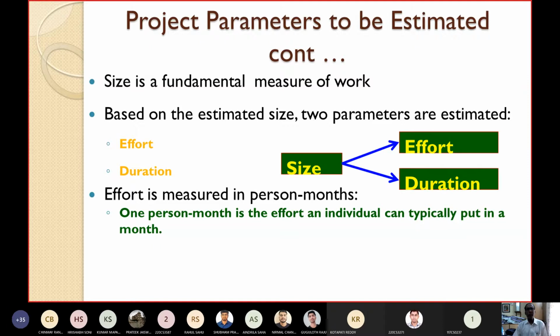I have already told you size is the fundamental measure. From size I can compute effort, and from effort I can compute the duration. If you know the effort, automatically you can estimate the cost. So these are the project parameters that need to be estimated.